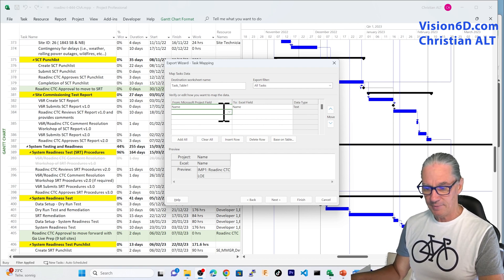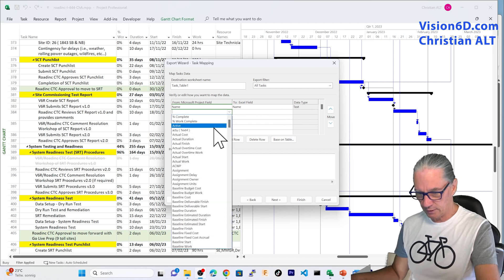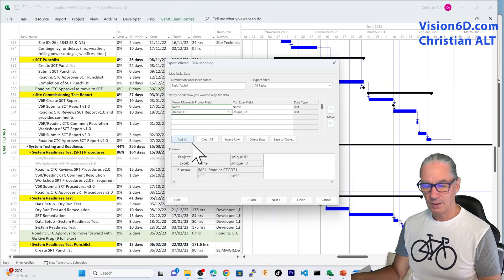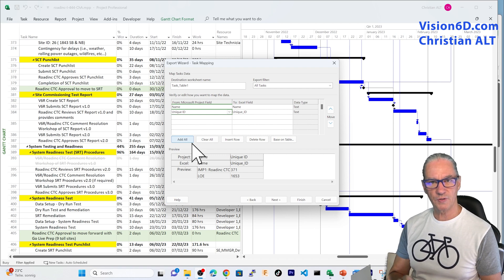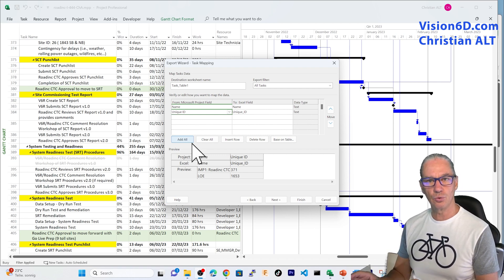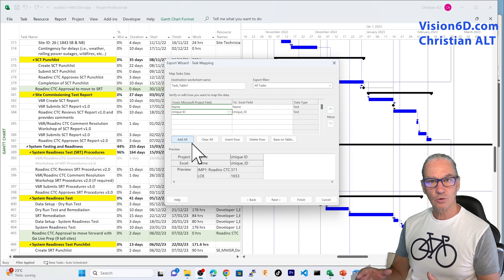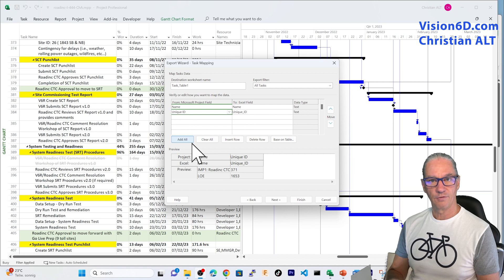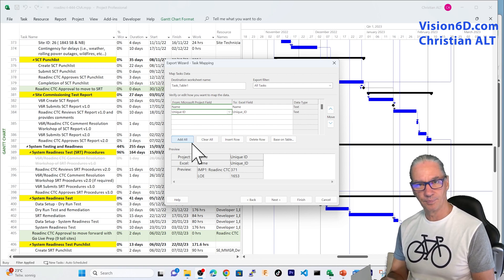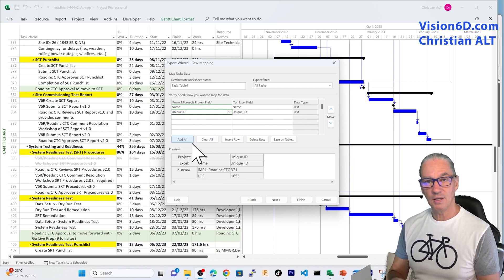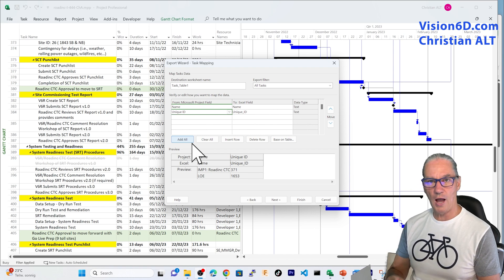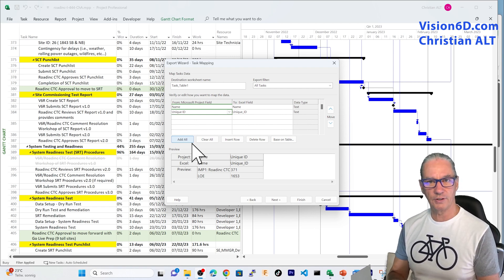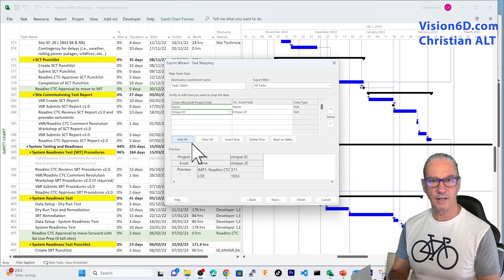An important point that I would like you to understand is what we call the unique ID. When you are transferring data between two systems, you must make sure that in the two systems, a task references the same activity. For this, MS Project is proposing you a unique ID. That unique ID, if you delete a task or you add new tasks, MS Project is making sure that that number is really unique in order to identify the task.